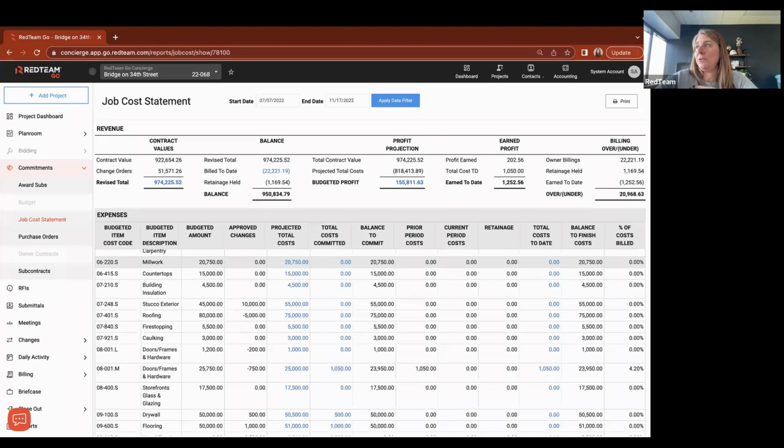Great question, Andrew. So we have 2 ways that a subcontractor invoice can be entered. We want the subcontractor to do it through their subcontractor portal. That's the easiest way for you guys to collect your subcontractor bills. So they will need a username and password to log into our subcontractor portal of Pasker. They have to sign their contract first, and then they'll be able to submit their subcontractor billing. So they will do it that way.